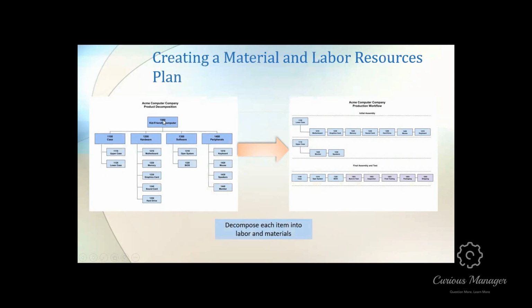As a quick refresher, the first digit is the first level, or tier 1. The second digit is the second level. Third digit is the third level. And if you had a fourth digit, which we do here, then whatever's on the fourth digit would go underneath here. Like for instance, if the uppercase had 4 items, we would list the uppercase items underneath the uppercase, and they'd be like 1111, 1112, 1113, 1114.